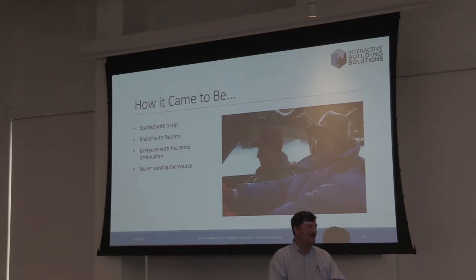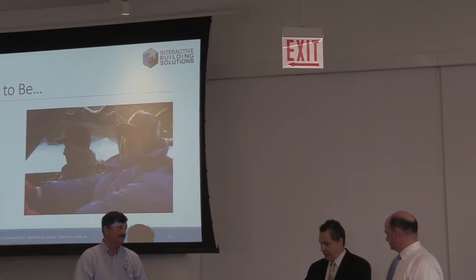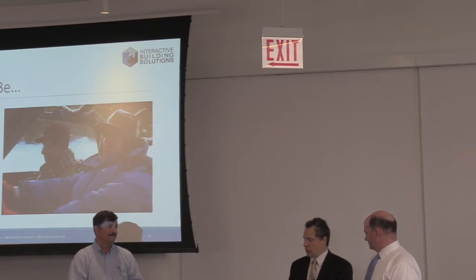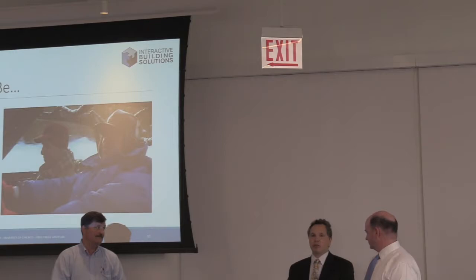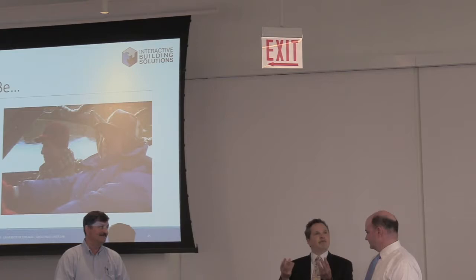So another aspect that I think, when I was talking to both of you, causes a lot of these problems is that the scientist says, like you were saying, I need this, and the contractors scratch their head and go and do their best to deliver those items. But there was never any feedback going back saying, well, this is going to be very hard. If you do this, it's going to be at the expense of this. We could make the project a lot less expensive if we could sacrifice. What do you say? And I think you were saying that in terms of these compromises, us being able to communicate the results of these compromises and inform you so you could know which decisions to make. You always made the decisions, but we informed your decisions. And I think that seemed very critical.